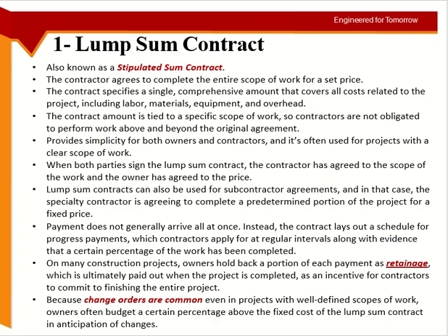So change orders are very common. That means any type of project can have some changes, right? To work with that, contractors usually keep a certain percentage within the lump sum cost for these types of change orders. So if it is between this much, I can bear it.